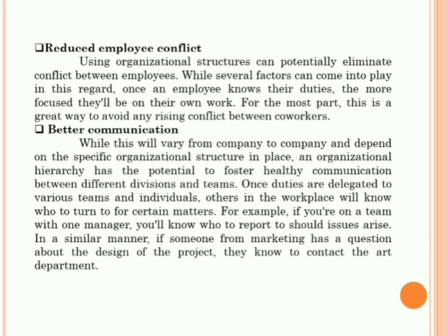In the education component, the need is for a structure that is more open and informal, where the time horizon is longer, with more emphasis on sharing and generation of new ideas in order to achieve innovation and creativity. In a reconstruction component, there are specific goals, a need for a rigid hierarchical structure, and a defined time horizon with little sharing of ideas.